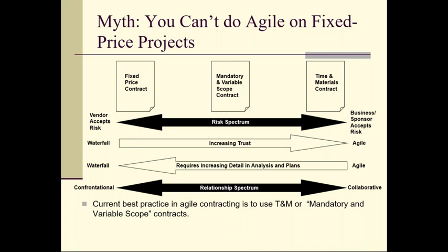Then we go through a process where we understand the team's capacity for work. Now, there's math involved. It involves old-fashioned estimating on small samples, not even random samples, but carefully selected samples of items off that backlog, off that variable backlog. We take a handful of items, we analyze them in detail so we can understand how much time they're going to take, and then we can come up with an estimate that will tell me how many points worth of work my team can do in an iteration. So we said they're 1 month iterations. Say my team is 6 people, so we can say how many points worth of work on average can my 6 people get done in an average iteration.